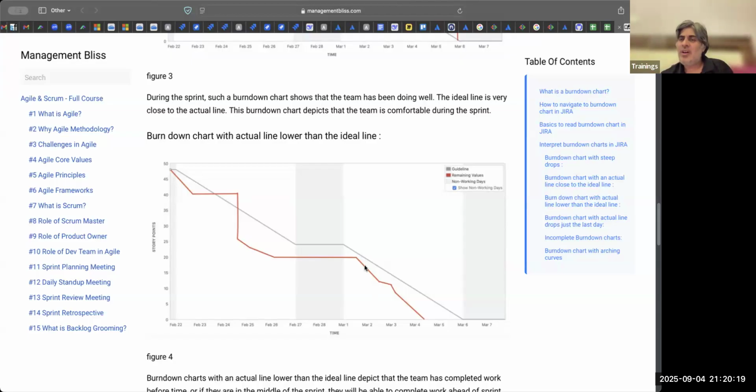They may have done a very good job on a story. People may have worked hard on a couple of days. That can happen. But if consistently they are losing 2 or 3 days, which means they are not taking up the optimum amount of work that they can handle. Now to your question, if this happens, what do we do for those 2 days?